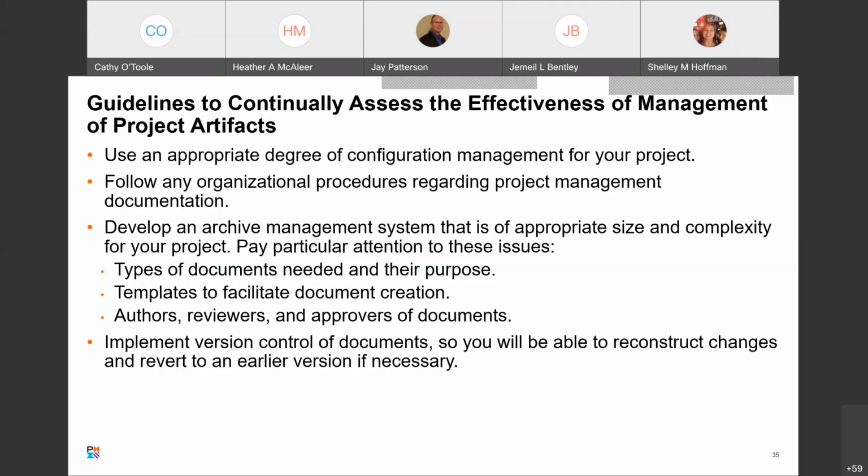Because I think I mentioned earlier that an audit could happen 5 years after the fact of when something is being billed from a tax perspective, we have to retain documents for up to 10 years. And so our documentation plans have to be a little bit more structured, and we have to be sure that certain documents are retained for that life cycle of 10 years. And sometimes that affects what some of our reporting systems do because they have to do that as well.